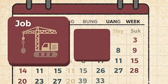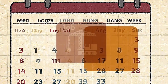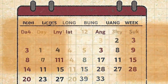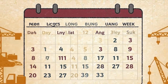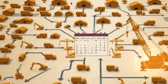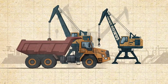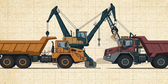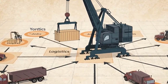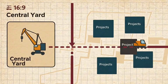That does not mean moving a giant crane always costs more than using it. Another contract may bundle mobilization into the hourly price. A longer rental may make mobilization small relative to total crane time. A nearby job may be cheaper to reach. A different crane may travel with a completely different support package. The important discovery is narrower. The customer is not buying only time on a hook. They may be buying transportation, permits, specialized people, setup, engineering, standby, support equipment, and the right to have all of it ready at a specific moment. Now the high bill starts to make sense, but only if the alternative is worse.